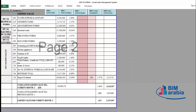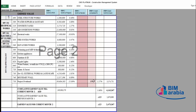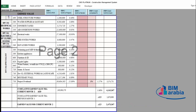At the end you will find the total earned value to date — the value of the completed work. The earned value is the amount of completed work till end of December: four million one hundred forty-three thousand, including all overhead expenses. The total budget of the project is shown here. The cumulative earned value till the previous month (month one) was one million six hundred seventy thousand, so the net earned value completed in month two is two million four hundred seventy-three thousand.